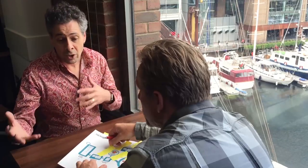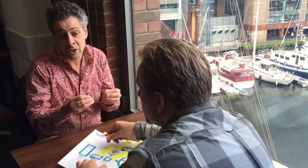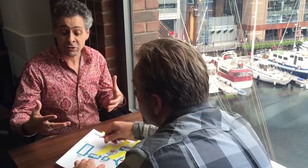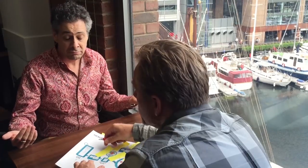What team may be working on which? Are there any dependencies between those teams? Things that the individual teams may not know. We have this coordination meeting at the beginning to add some transparency to that. After that meeting, teams just do Scrum planning like they've always done.